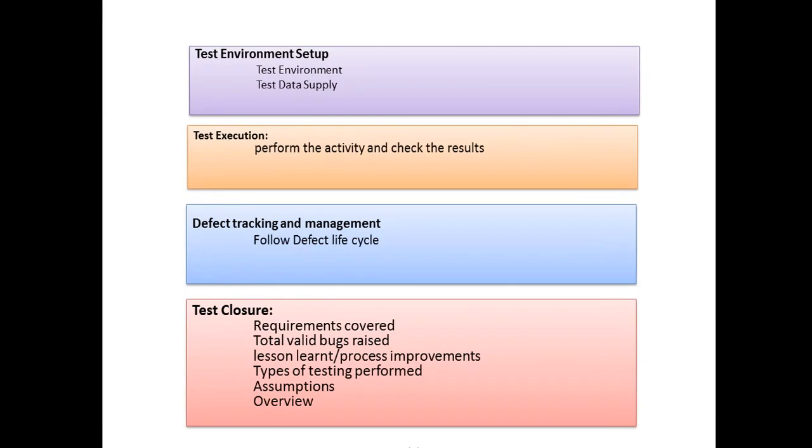Next is test environment setup. After test execution comes defect tracking and management, which will be covered in a different video including the defect life cycle. In test closure activity, we supply a document to stakeholders about what we've done in the current release. It covers requirements covered, total valid bugs raised, lessons learned, process improvements, types of testing performed, assumptions, and overview.